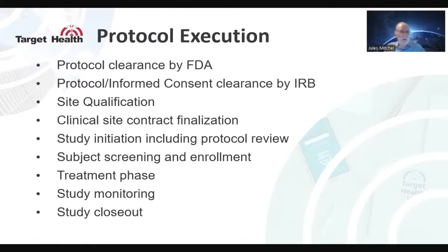Okay, in terms of protocol execution, make sure the protocol is cleared by the FDA. It's usually the IND for drugs, an IDE for devices and diagnostics. Okay, we have to have the protocol and the informed consent cleared by the IRB or the ethics committee. Okay, and then we have to qualify the sites. Make sure the sites are qualified to do the study, and we'll get to a little more detail on that.